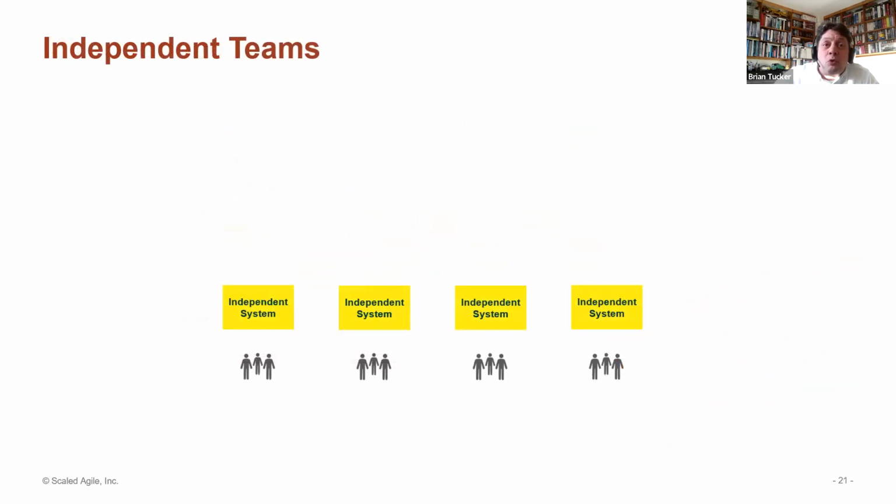Sometimes there are a set of small independent development value streams left over that don't have anything in common. The teams looking after them can't easily transfer to another development value stream and support it because of the domain knowledge involved. What you shouldn't do is group these teams into a train, because the worst place to be putting together a plan is in a big noisy room full of people you don't interact with. And one development value stream's business owners generally aren't interested in the other development value streams, so PI planning starts to fall apart. It may be slightly heretical, but not everything has to be a train.